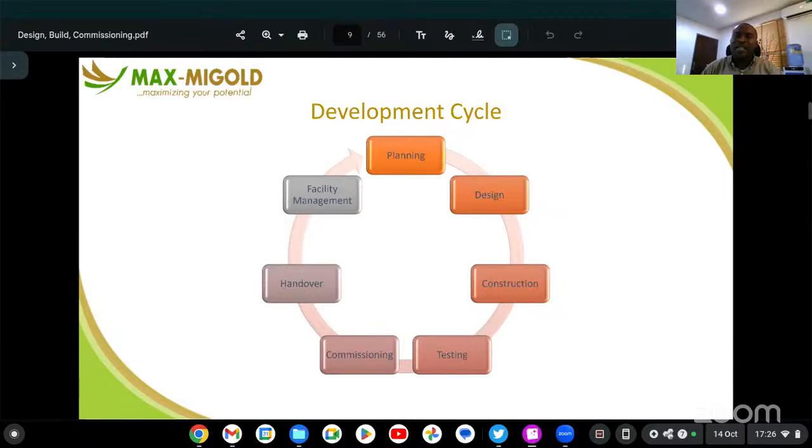At times, during the design stage, it depends on the project. Licenses from state government and federal government are also issued. So all these are things we bring together to make sure that that particular action is actualized. So, for instance, now we have drafted the RFQ for vendors to quote, and they've sent it. Then, after thorough checks, you come to understand that out of 3 to 5 vendors, one seems to be okay technically. The commercial is a bit wild, but you try to negotiate.